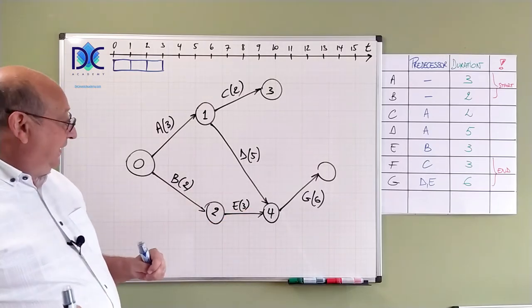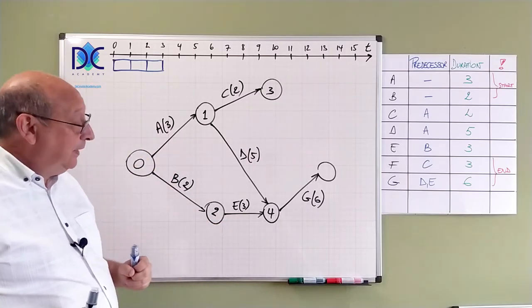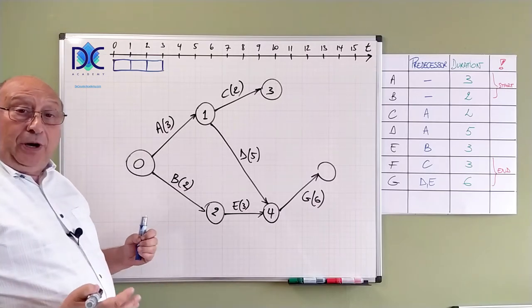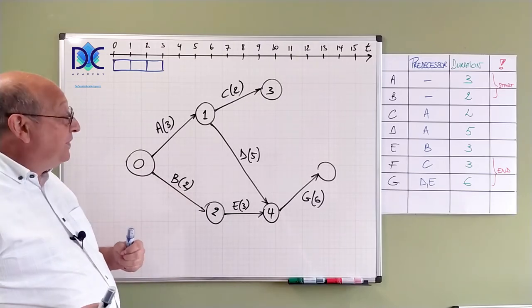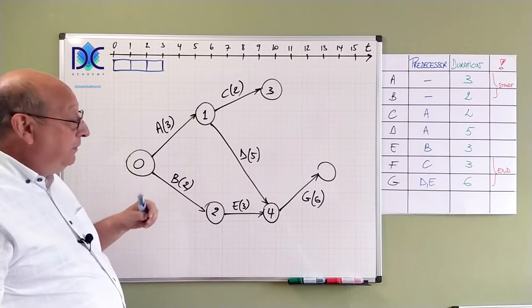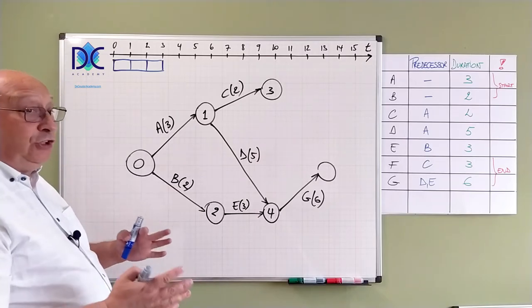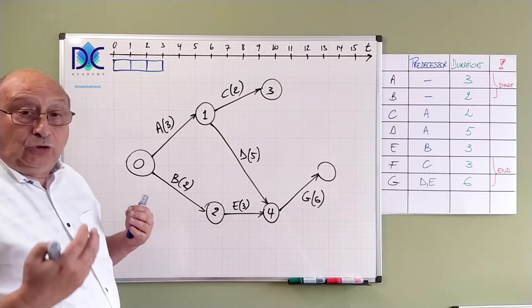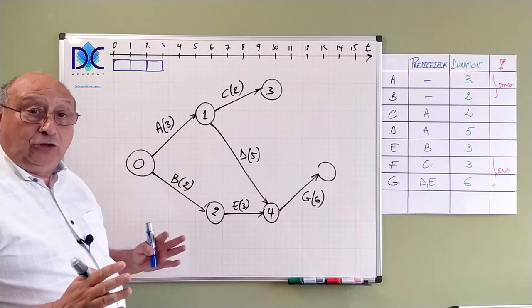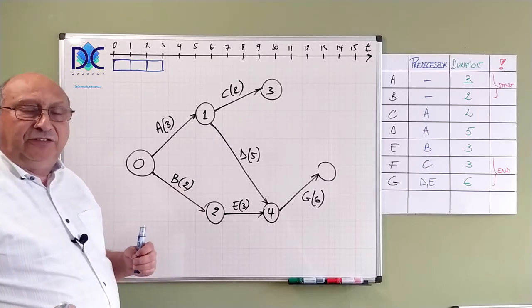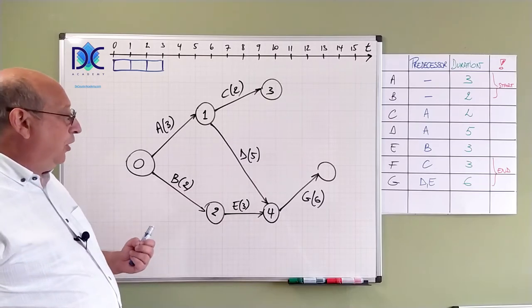Now just imagine that E should also be after A and B would have two predecessors. That would create a problem because I cannot have two arrows between two nodes. I can only have one arrow. In order to resolve that problem I should draw here a dummy activity. Just to be sure that this rule is correct. So there are some things that you have to be careful about when you're using this method. They have dummy activities and that's not always clear. And makes the method a little bit more tricky to complete.